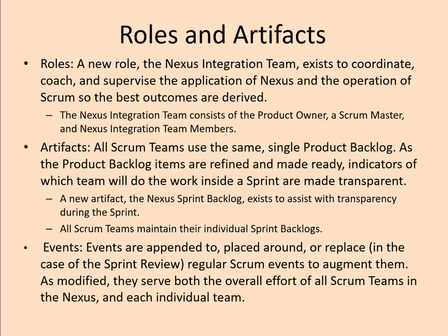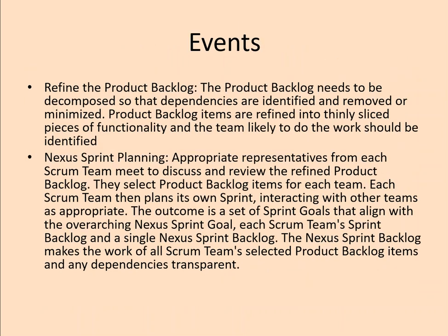The events. Events are appended to, placed around, or replace regular Scrum events to augment them. The first event is to refine the product backlog. The product backlog needs to be decomposed so that the dependencies are identified and removed or minimized, because there are so many teams working on it. So the dependencies should be identified and taken care of.